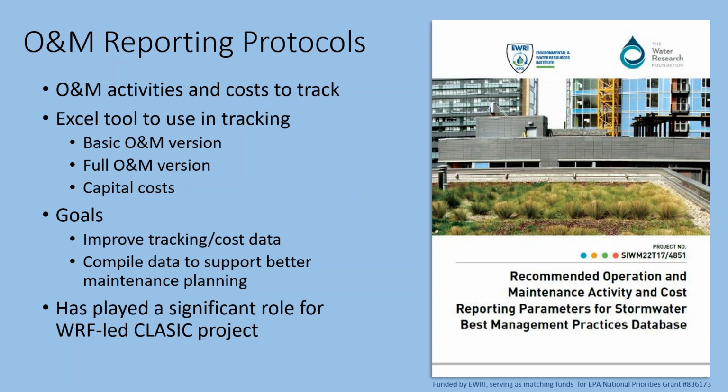And as a companion to this document, we created two Excel tools to record and track cost data. One is a basic tool where if you only have, say, an annual cost for a BMP, you could record costs that way. And then the second version was a full version that has more detailed cost reporting parameters. I'm going to walk through those in a minute. And then we also added in a basic capital cost form as well.